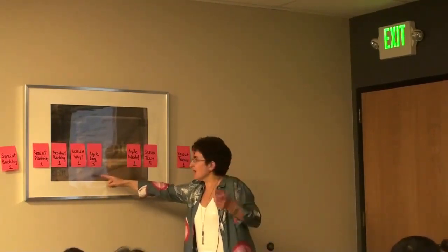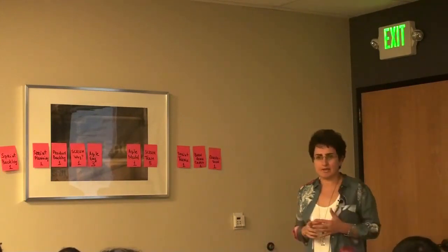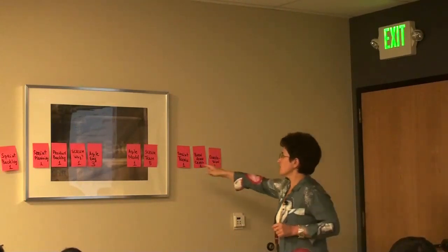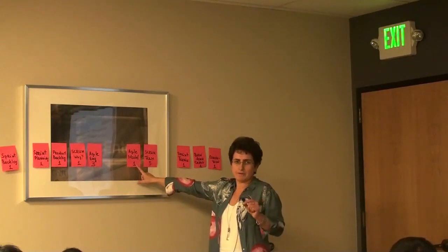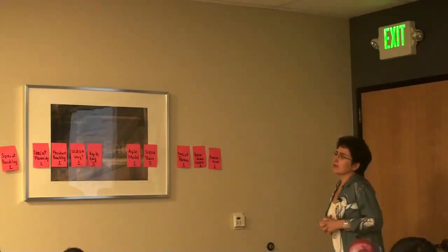But in real life, people provide those estimates in man days, which means if one person is developing, let's say, this feature, how many days it will take this person to develop and test. For this feature, maybe 1 day. For this feature, it will be 5 days, and stuff like that.